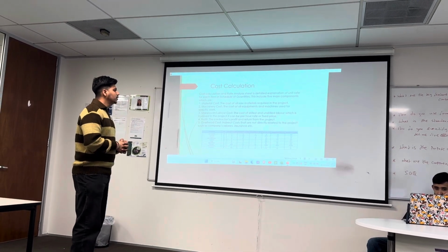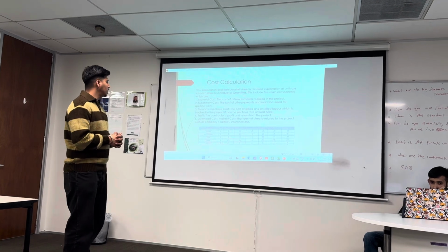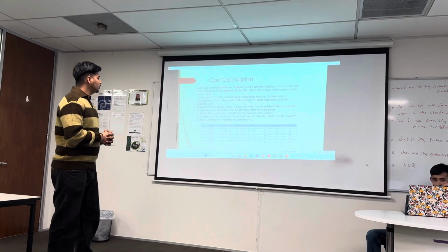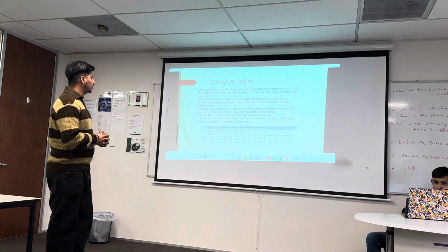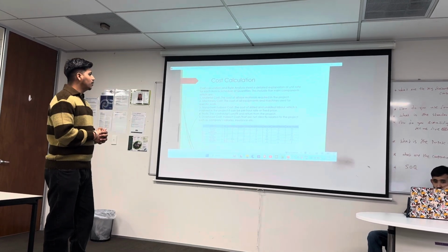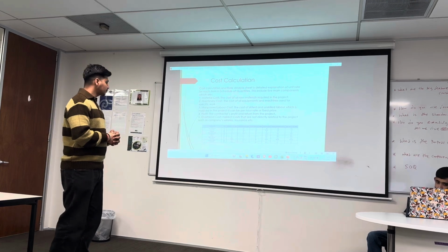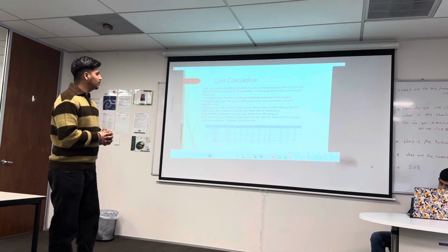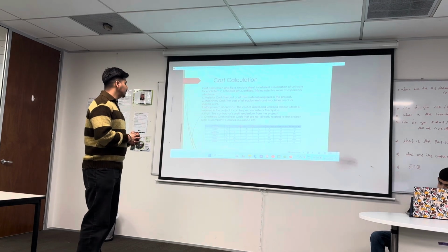This includes 5 main components, which are material cost, machinery cost, manpower or labor cost, profit, overhead cost. First one, material cost. The material cost of all raw material required in the project. Second one, machinery cost, the cost of all equipments and machines used for the specific work.